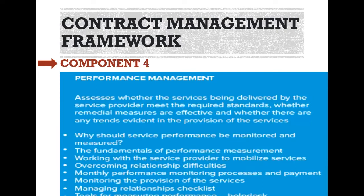Component four: Performance management. This component assesses whether the services being delivered by the service provider meet the required standards, whether remedial measures are effective, and whether there are any trends evident in the provision of services. Topics include: why service performance should be monitored and measured, the fundamentals of performance measurement, working with the service provider to mobilize services, overcoming relationship difficulties, monthly performance monitoring processes and payments, monitoring the provision of services, tools for measuring performance, and helpdesk.